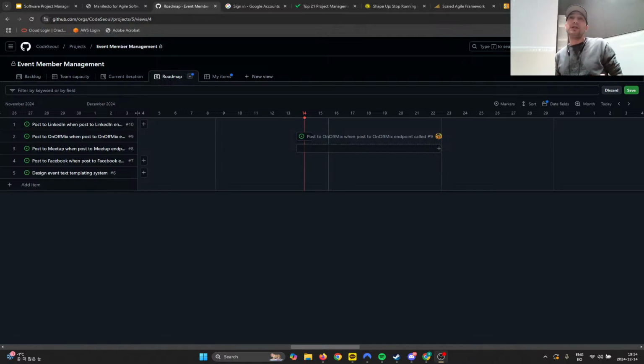Right now, what we do is we slow our delivery timeline, and we have development and QA as separate sprints. Basically, QA is testing the previous sprint's development, and each sprint we allow some buffer to work on the bugs that QA generates. That's how we're doing it now, similar to what he was saying. But it's unfortunate because then everything takes twice as long, because we have to wait.